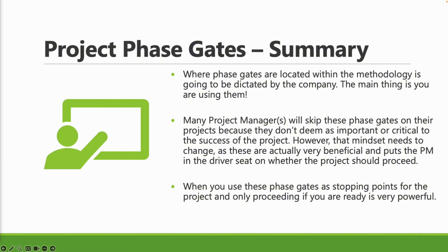I think project managers have to use these phase gate processes to their advantage, and they have to checkpoint to see whether the project team has delivered the things that they needed to deliver before going on to the next phase. So I'm going to come back to that stopping point again.